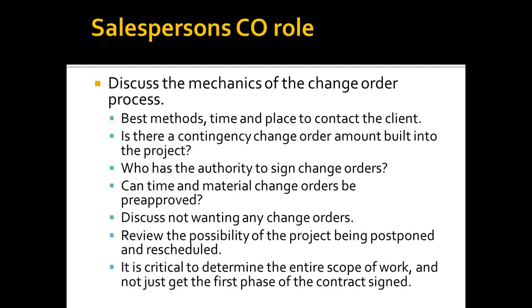And again, I think just a warning here: if both parties, if the husband and the wife have not signed the original contract, they would not both have the authority to sign change orders. Change order, as I said earlier, is the changing of the original contract. So only the people that have signed that contract have the authority to sign the change orders.